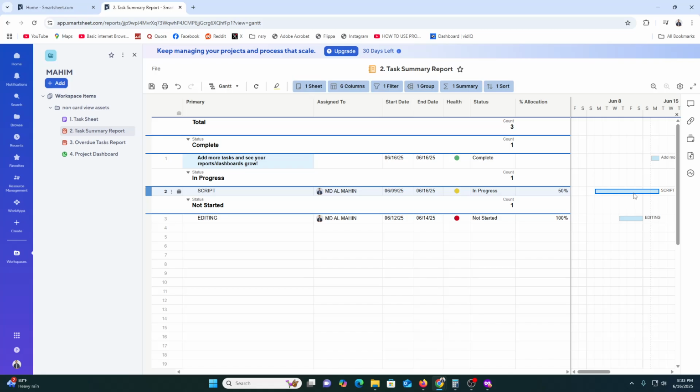Then let's go ahead and automate our workflow. SmartSheet allows basic automation like sending reminder emails, notifying the team when a task is assigned, and moving rows automatically when conditions are met. Then you can go to automations. Just go to automations. Here you will get options called automation. Just click on it, and then you will get options like create workflow, and you just need to choose the trigger, condition, and actions, like no coding required. So it's really amazing. As a beginner you can start your work.